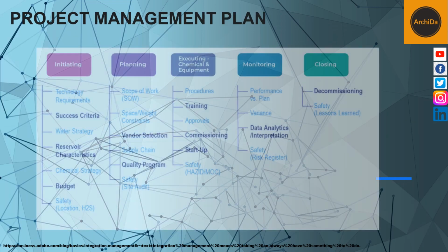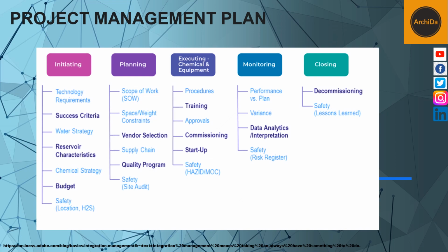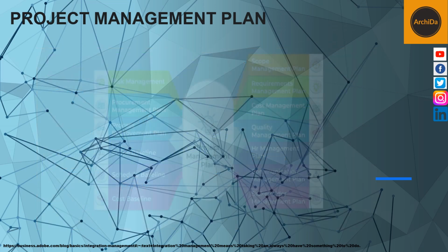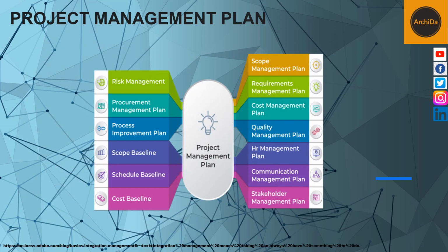Project Management Plan. The project management plan brings all aspects of the planning phase together into a single document. It includes elements such as project goals, budget, risks, scope, work breakdown structure, stakeholder management plan, and change management plan. This fixed plan should not change without a formal change request.